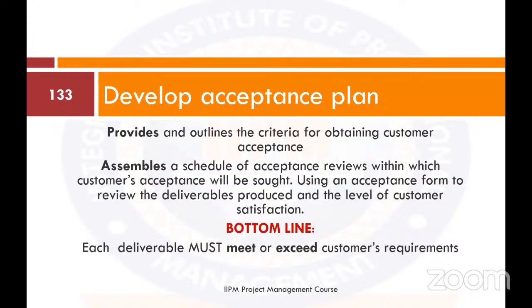Now, for the acceptance, it provides and outlines the criteria for obtaining customer acceptance, assembles a schedule of acceptance reviews within which customers' acceptance will be sought, using an acceptance form to review the deliverables produced and the level of customer satisfaction. The bottom line is each deliverable must meet or exceed customers' requirement.